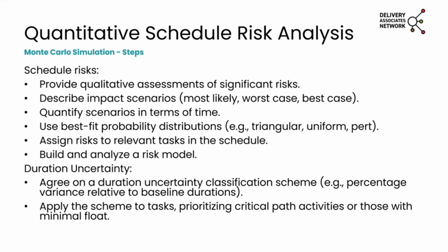So there are softwares that offer cost and schedule risk analysis together, like Safran, but you can model schedule risk analysis on Primavera Risk Analysis, which is essentially an Oracle software aligning with P6 quite well, but quite outdated also because it hasn't been updated since 2012, but it's still very commonly used.